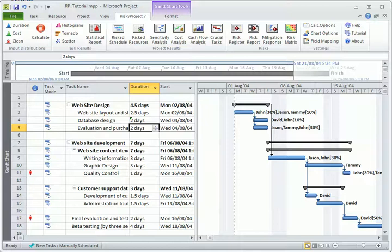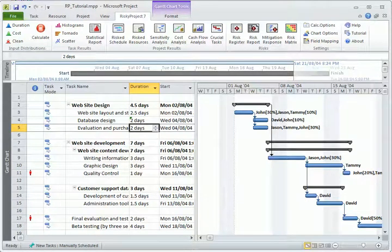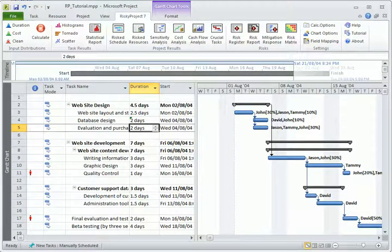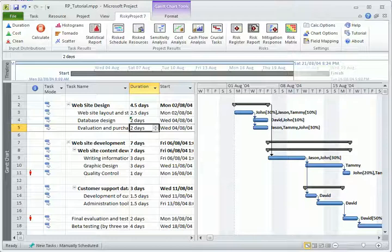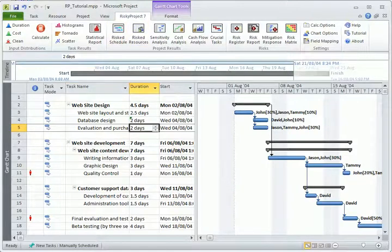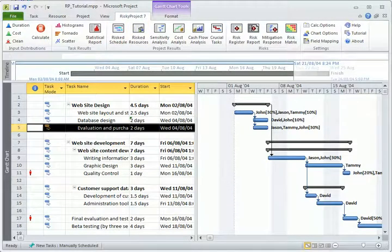Using the Risky Project Toolbar, you can assign statistical distributions of duration and costs for various tasks.